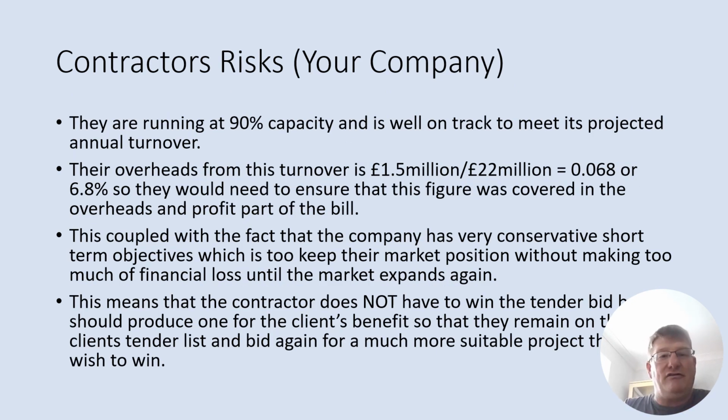Then you look at yourself in more detail. You're working at 90% capacity, so you're on track. Okay, your overheads are 1.5 million, your office overheads. So I make a quick calculation, so about 7%. So we've just got to make sure we cover those overheads. However, we do have this loss that we've got to make up for as well. So we've got to bear that in mind as well.